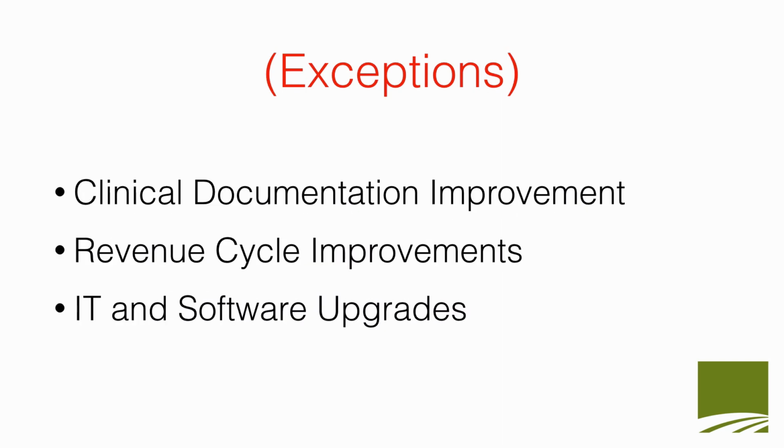Now let's look at some exceptions. I should go ahead and say that there are a few exceptions to the split project approach. Clinical documentation should continue through this time. Personally, I do not put clinical documentation improvement under the scope of the ICD-10 project because it's not really a project activity. It's an ongoing improvement, so I categorize it under operations work and not project work.